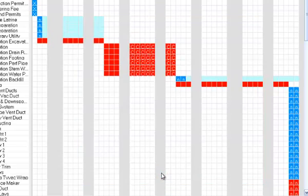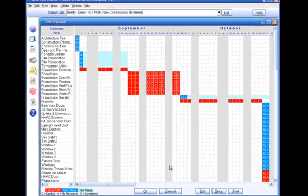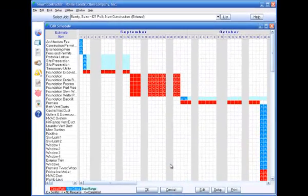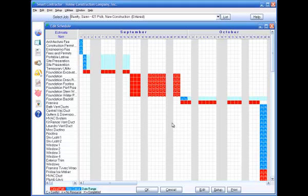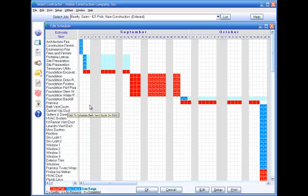A few more things about the schedule grid. The gray columns represent non-work days. Smart Contractor assumes you won't schedule work on the weekends, but if you want to,